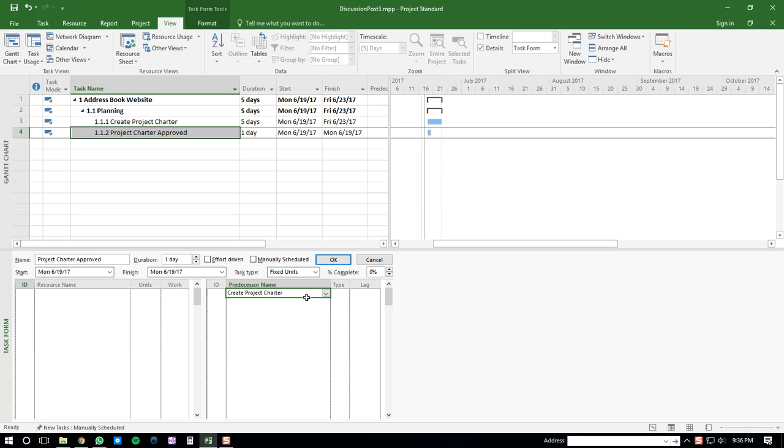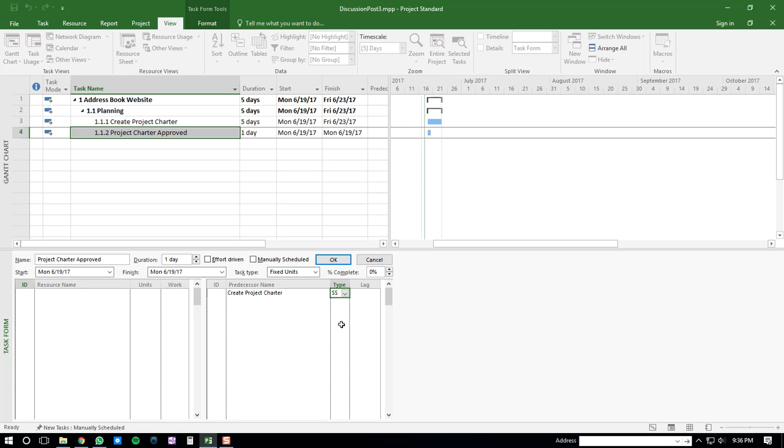Once you've done that, you'll go to the Type, and then you'll select SS, which is start-to-start, and then you'll click the OK button, and once you've done that,